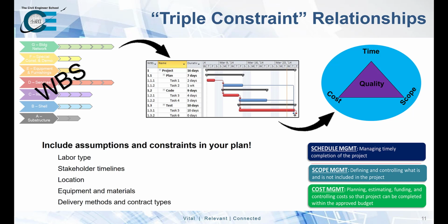Additionally, the complexity and time frame required to complete these tasks will influence their cost. A larger and more complicated unit may require specialized technicians to install it, driving up the cost. Or perhaps the old chiller has failed, demanding the new one be operating as soon as possible. The government then gets billed at an emergency rate due to the response time.